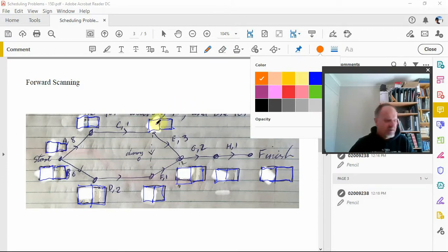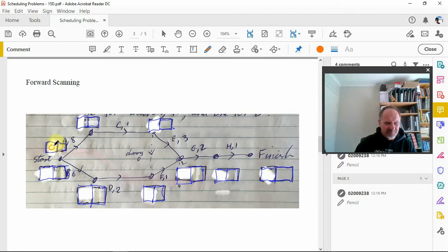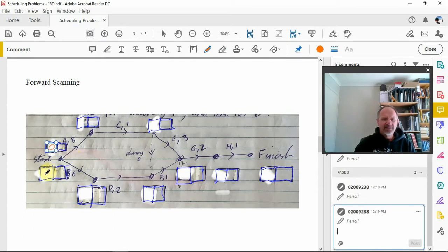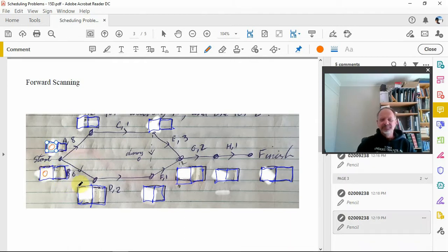All right. So we draw the split boxes and then we look at the earliest we can start, which is time 0. And the same here for this task across there. That's B. So the earliest they can start is straight at the same time. So now we're looking at time from the start here, right?